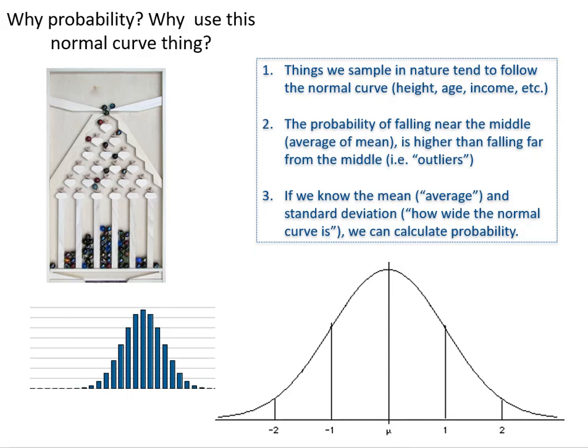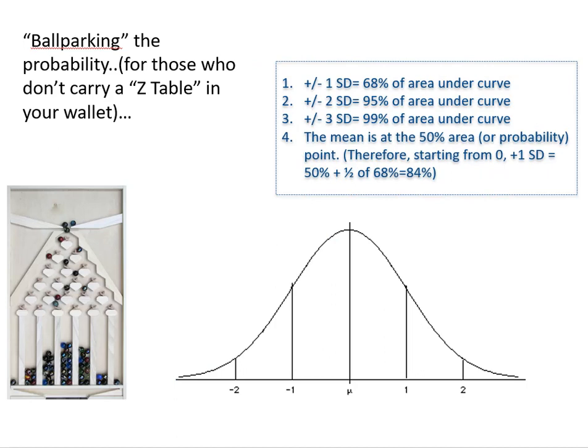Because we have found the project mean, what we have actually done is find the duration of the project that has a 50% probability of being achieved. That's an interesting number. So the number that arises out of 3-point estimates, in this case from executives who are pushing for project reduction in schedule, what they've come up with is something that only has a 50-50 chance of being achieved. And we can examine this